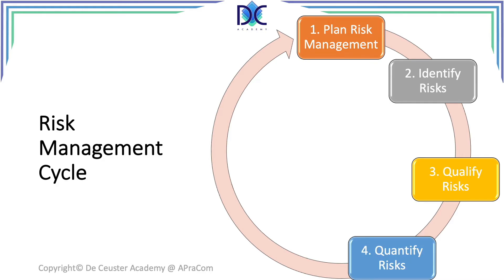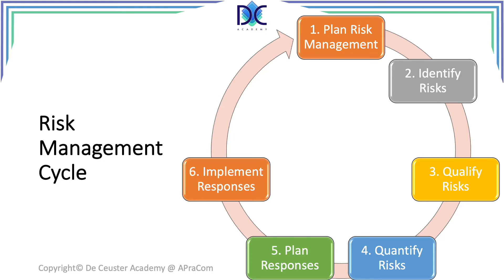The risks selected in the qualification process will now get quantified and we will calculate the financial impact on the project. Plan responses is about planning risk responses to deal with the selected and quantified risks. Once the project starts, these planned responses will be implemented. Implement responses is about implementing the planned responses, and the last step is control risk. Here we will evaluate how well the risk management plan is working and what improvements have to be implemented to increase efficiency or deal with unexpected events.